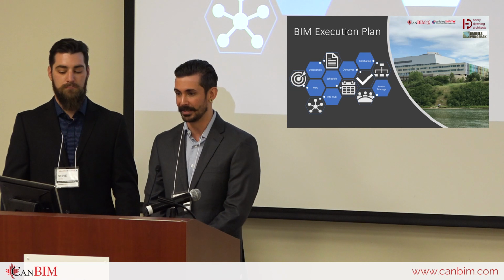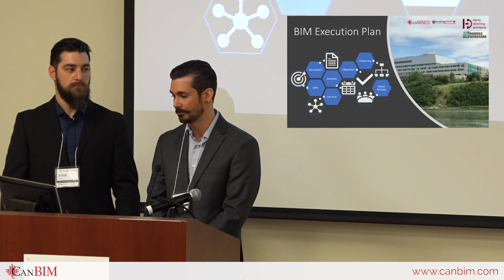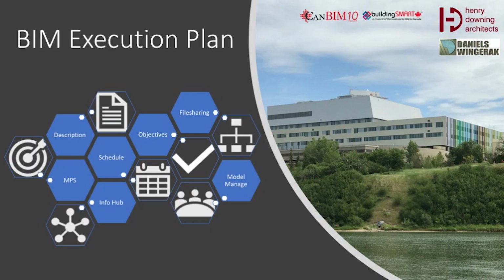Another thing to point out here was at that time, and it can even be argued now, LOD wasn't clearly defined. Now I think everyone has a better idea, but it's not totally standardized yet. There's still a lot of different takes on what each level of development means. So I'm glad, I think, Bill, you touched on that earlier, so I think that's a conversation that still needs to continue happening. Another part of the BIM execution plan that coincides with the information is the schedule. The MPS is integrated with the project schedule to ensure we're meeting our goals at the appropriate milestones, and that there was enough developed for the clash detections at those milestones.